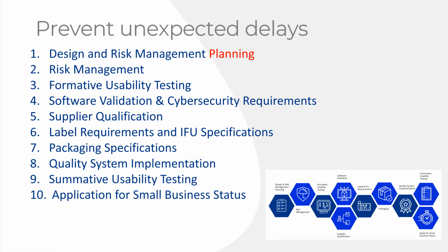The cost is not in the audit of the supplier. You could do a desktop audit. You could do a remote audit. The cost is in having to redo all your verification validation testing. You made a change. So pick wisely for suppliers and qualify them early and get them set up for being your commercial supplier, not just a prototype supplier.